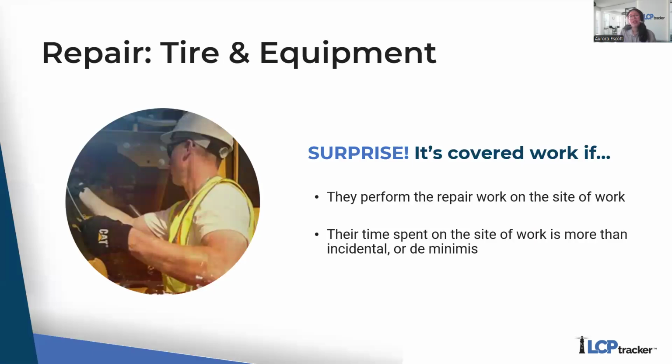Let's keep going. So tire and equipment repair. For enforcement purposes, if these employees spend more than 20% of their time in a work week on the job site doing tire equipment repair work, then guess what? They would be covered under Davis-Bacon for all that time spent on that job site for the week.